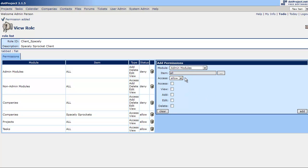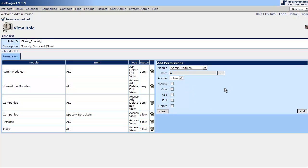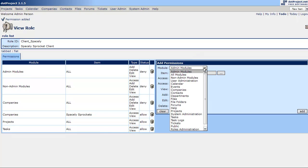And I'm going to keep task logs at bay right now. This is a judgment call. Sometimes project workers get candid in logs. A little too candid for a client. So, the best thing is to keep the client access to really only see progress. So, that's what they'll be able to see. Let them contact your project manager for details. So, right now what we've got is that we've denied access to everything. Then we brought back that they can see only the company, Spacely Sprockets.